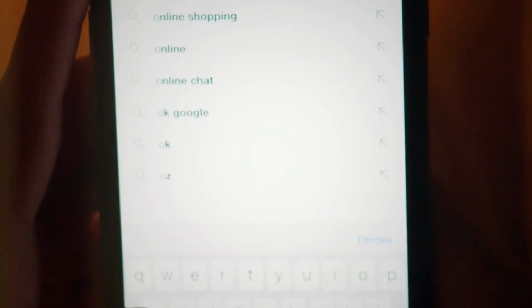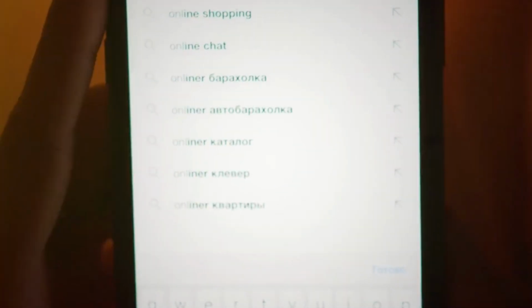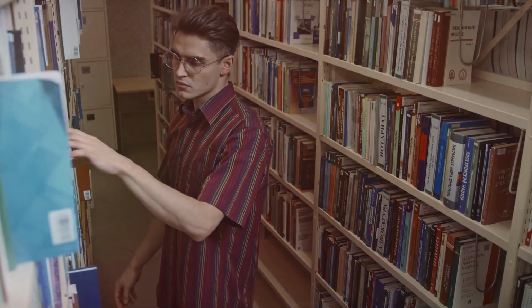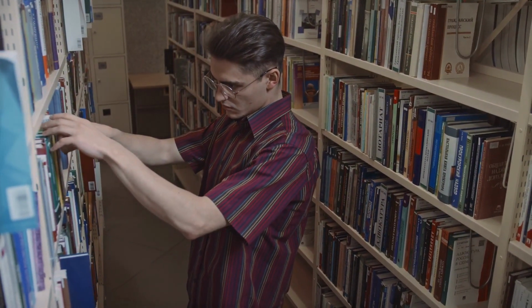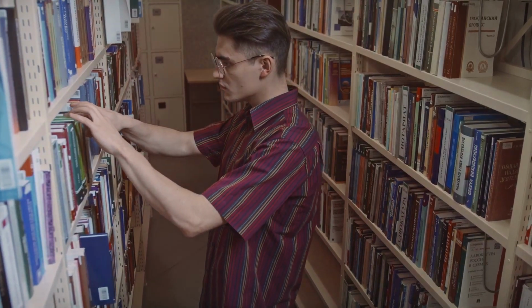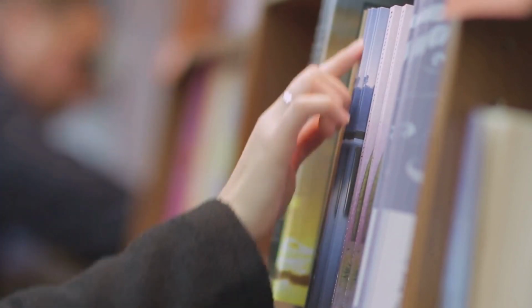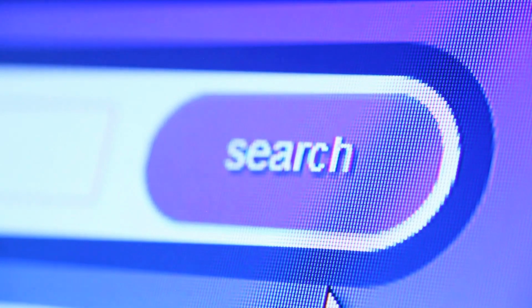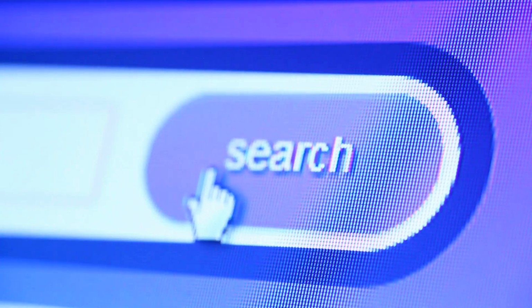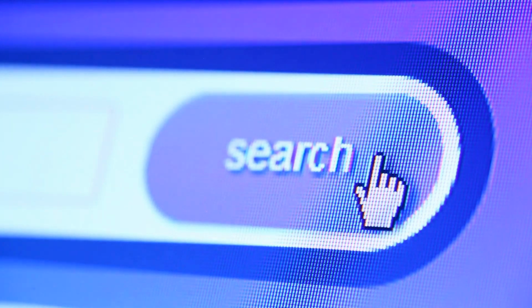One of the features is the ability for library members to search for books. The acceptance criteria for this feature might include: 1. The system shall allow users to search for books by title, author, or ISBN. 2. The search results shall display the book title, author, availability status, and due date if checked out. 3. The system shall allow users to sort search results by relevance, publication date, or author's name.